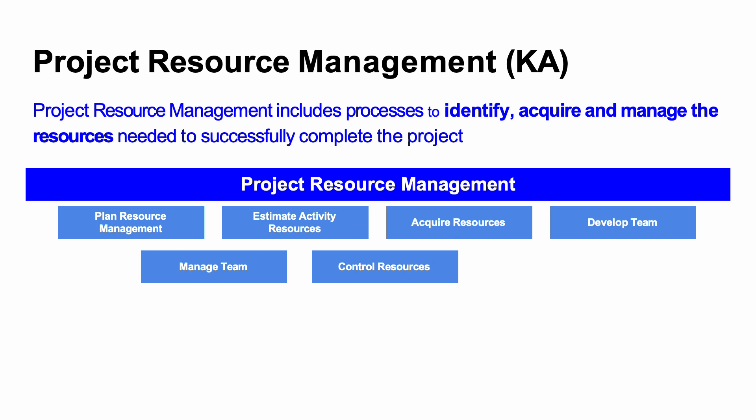Project resource management is comprised of six processes: plan resource management, estimate activity resources, acquire resources, develop the team, manage the team, and control resources.